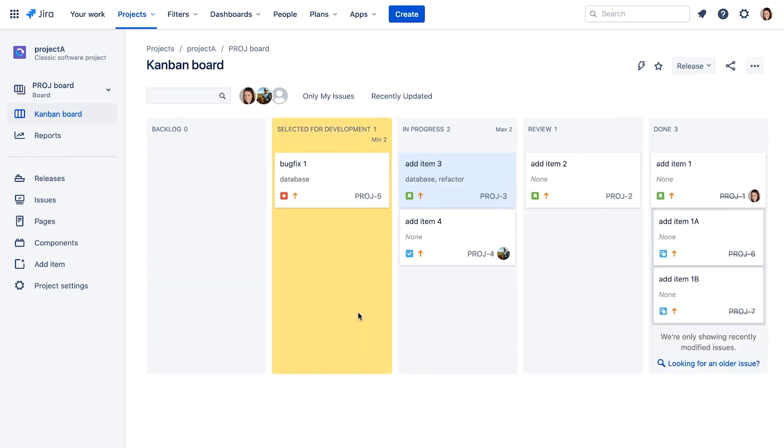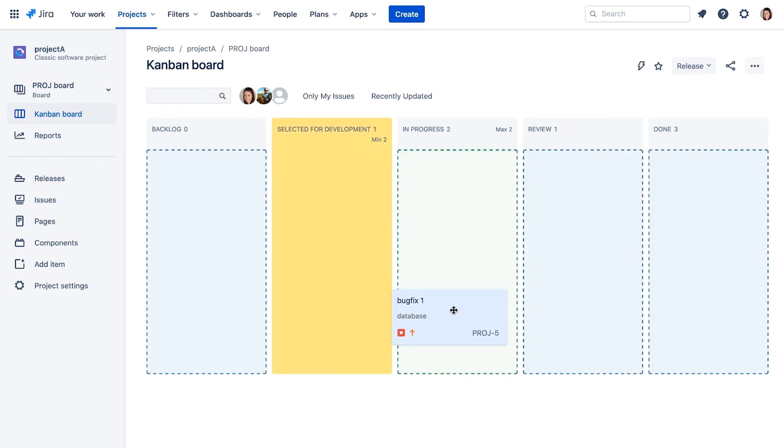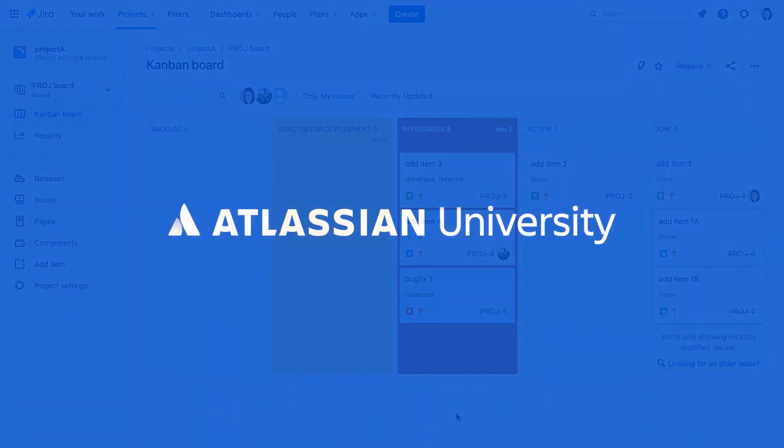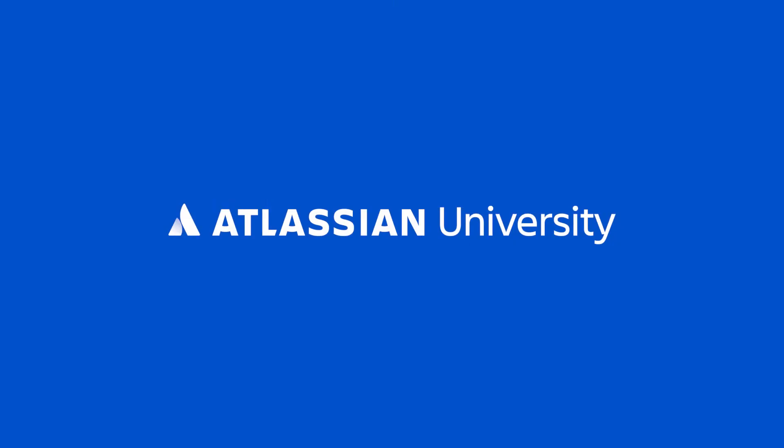Let's violate that limit by dragging three issues. The highlight indicates there is too much work in progress. So the team should focus on moving issues out of the in progress column.